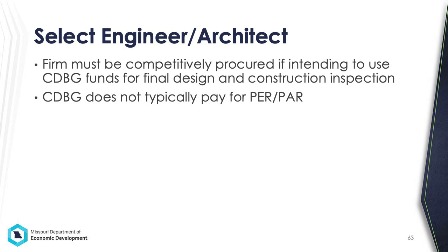Similarly to the grant administrator selection process, if pre-selecting an engineer or architect and intending to use CDBG funds, you will be asked to provide procurement documentation in order to receive a CDBG debar check approval letter. That letter and the executed contract must be submitted with the CDBG application. If you don't intend to use CDBG funds, we do still recommend uploading some sort of documentation to show that you pre-selected so that you get some credit for project readiness during the scoring process.